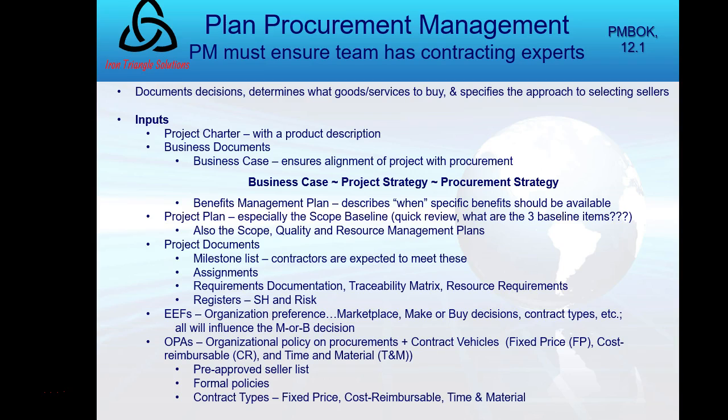In this process, we want to document the decisions, specify the approach, and identify potential sellers. The key benefit of this process is that it determines whether we're even going to acquire the goods or services from outside the project or inside. And that's going to be the make or buy decision that we have in the set of inputs.